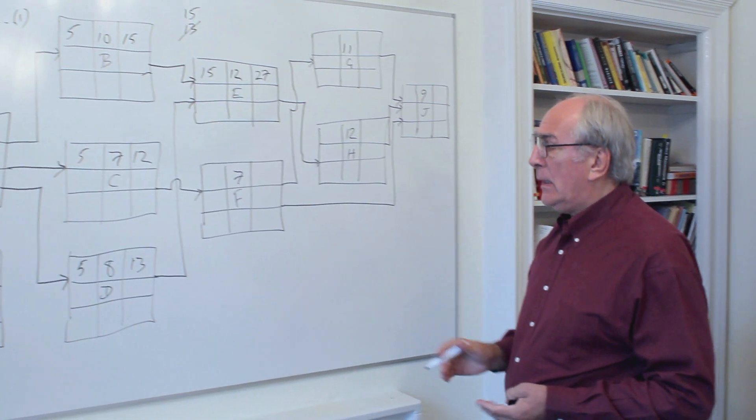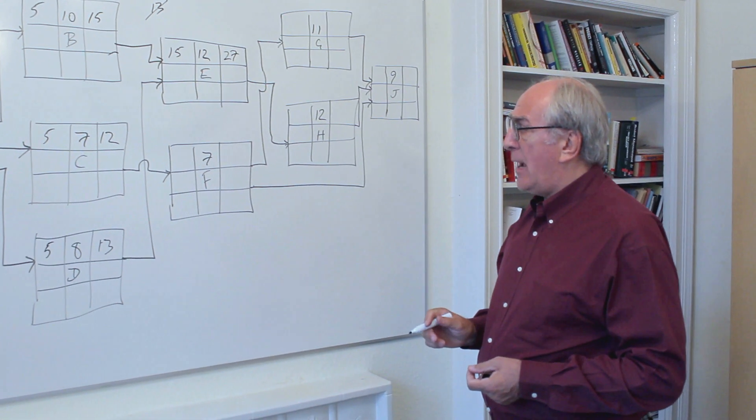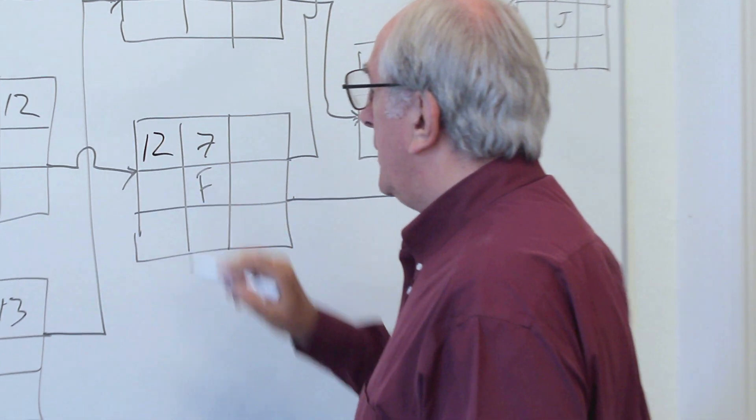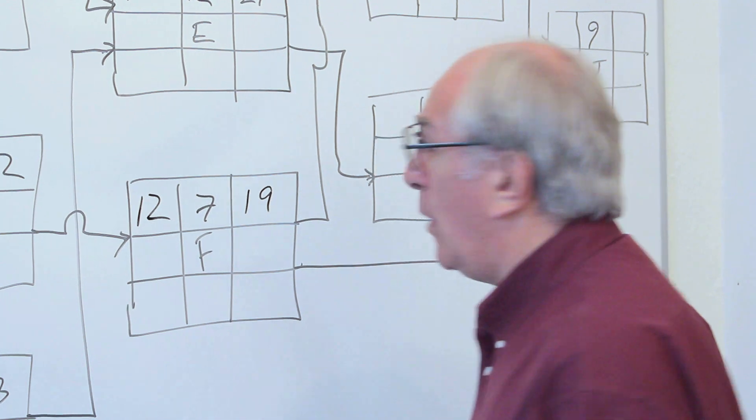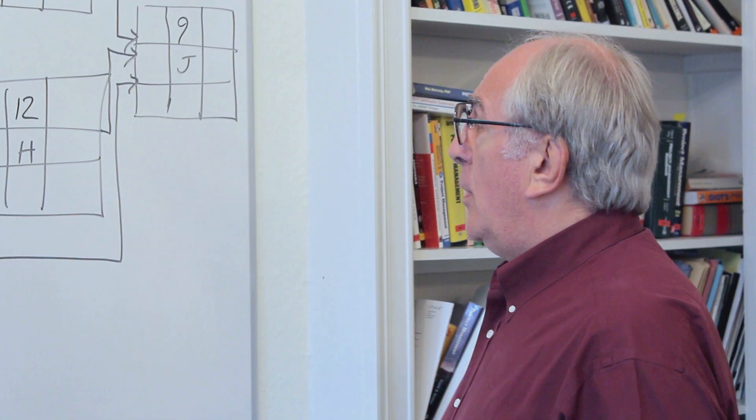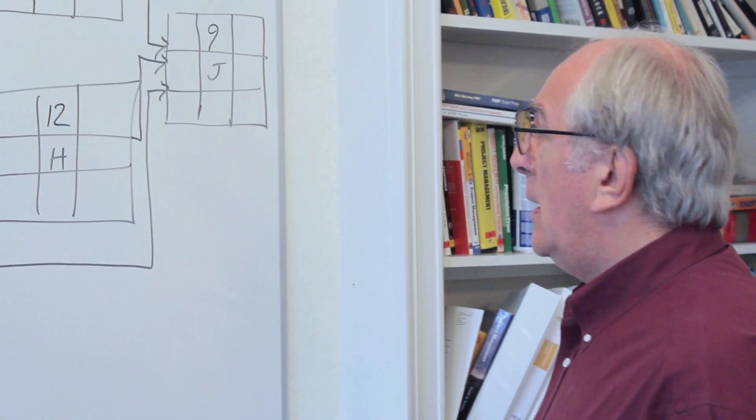Simply looking at activity F, there's only one activity driving that, that's C. So that early start is 12, giving us an early finish of 12 plus 7 equals 19.